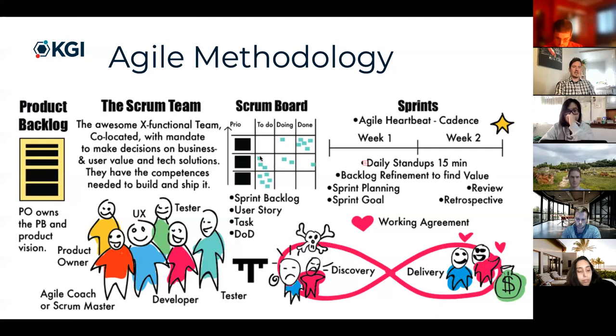So I've got my priorities, and each of these, typically they're like Post-it notes that I'll have in my office, where I'm saying, okay, in order to build, let's say, a location finder to get medications delivered to someone by drone, I need to first implement a map. Second, I need a way to understand where people are. Third, I need to understand where my drugs are. And then fourth, I need to match those drugs with people so that I can create this interactive map where people can find the drugs that are closest to them and get them delivered. So that's what I do on this Scrum board.